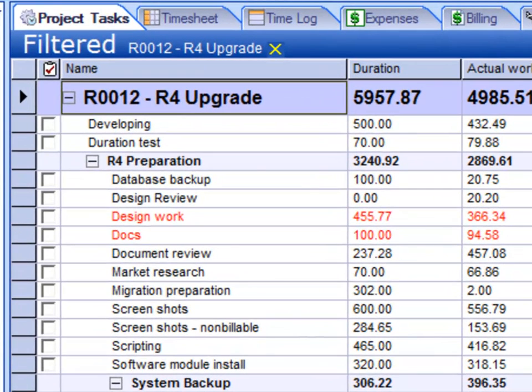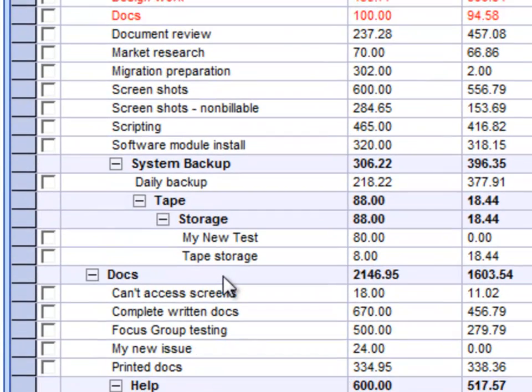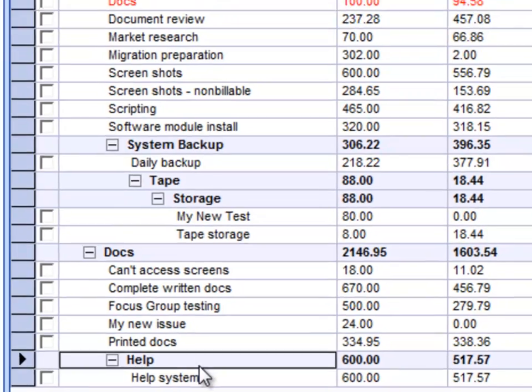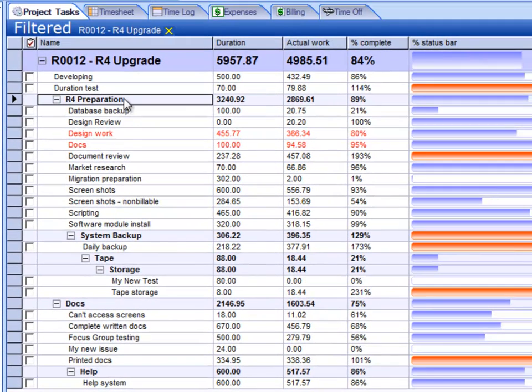Now, you might consider breaking the project down into sub-projects like you're seeing here, or phases. Each one of those phases could hold all of your tasks for that phase, and then all of the deliverables and milestones that you intend to deliver to the client. You could show where payments are due if payments are tied to phases or milestones.